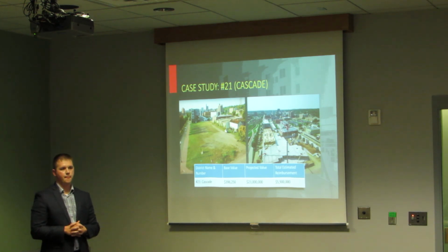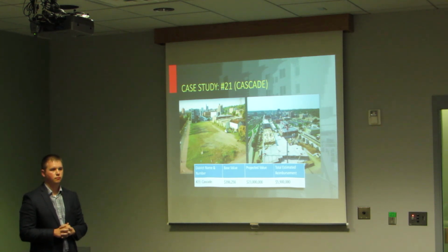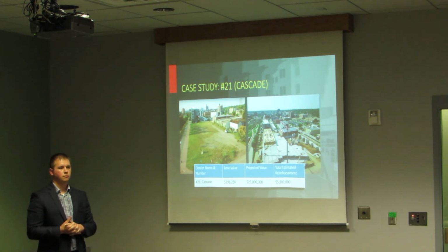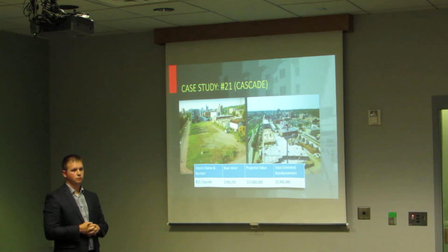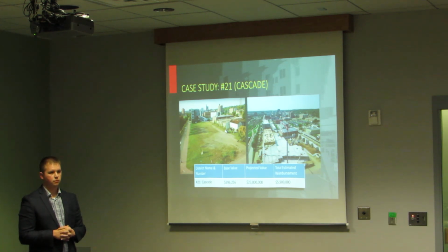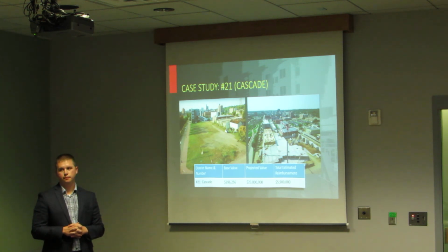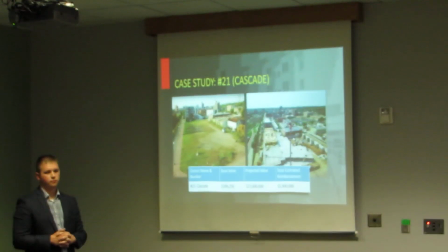We've had other TIDs where they promise all these structures and all this increment as part of the project plan, and then they sell it to a nonprofit, or they don't build it in the timeline. Again, you prolong when you start receiving those increments, it costs you more in interest fees, and it costs you more down the road because your project costs have increased, and then they come back and ask for amendments because the project costs increased.